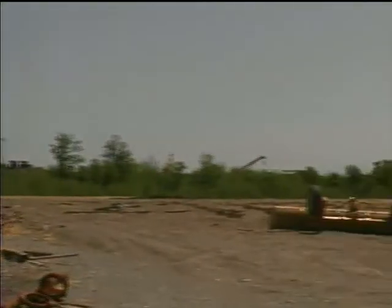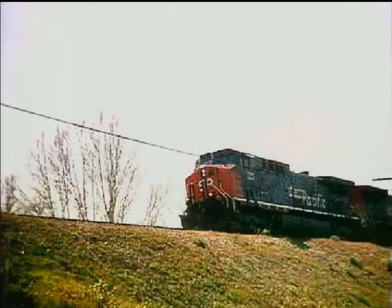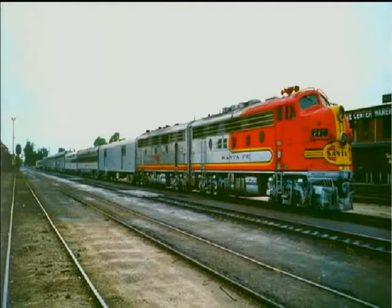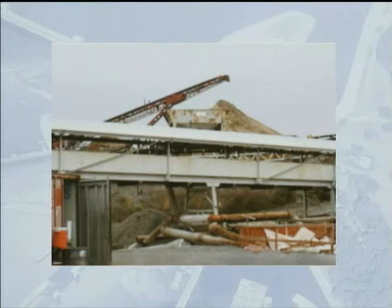TVA Area 5 has also been designated an area for staging and laydown. This area appears to be among the best choices for material fabrication yards, as rail access will permit efficient transfer of materials to the site. In addition, TVA Area 5 was also identified as a preferred location for the conventional concrete batch plant that supplies nearly 500,000 cubic yards of concrete for the lock construction.